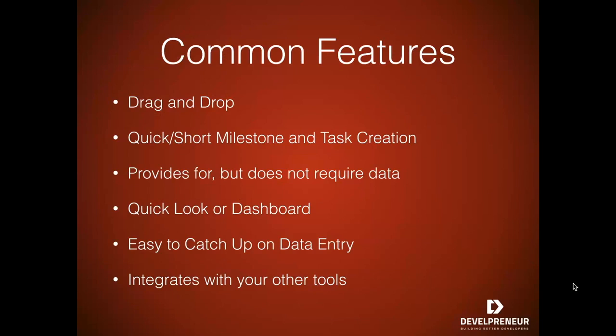It is very useful with these things. I talk a lot about not needing a lot of reports, but I think the one output that you are going to benefit from a lot is some sort of quick-look summary dashboard. So you can look at it and see how many tickets are in this project, how many I've worked on or completed, what's behind. If I put in estimated completion dates, how am I doing against that?